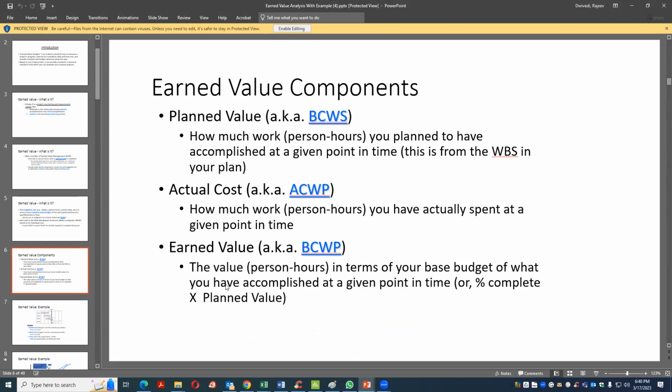Planned value. So basically every project or every task has a plan, that how much time it is required, when, in 1 week how much it will be done, 2 weeks how much it will be done, and so on and so forth. So that is the planned value. Actual cost: after 1 week, how much money is actually spent. So this is a planning one.